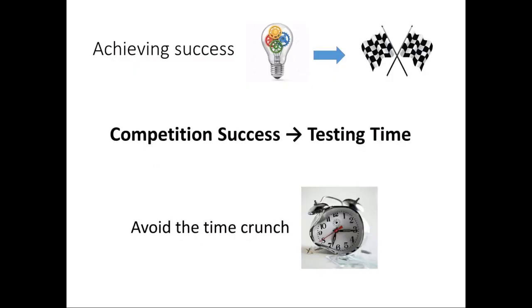In our experience of observing competition teams at the BIC, success in competition is usually traced back to effective project management, having time for testing, and avoiding the time crunch at the end. Testing takes place throughout the project and not just at the end, so testing should be built into the plan for subcomponents, subsystems, and the final system when it's finally all put together.